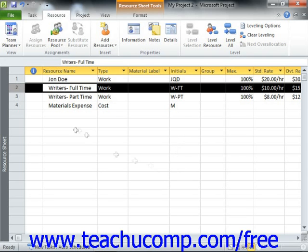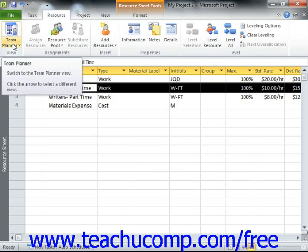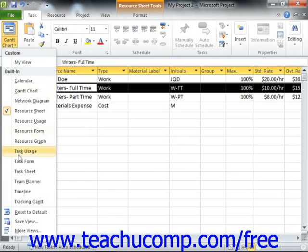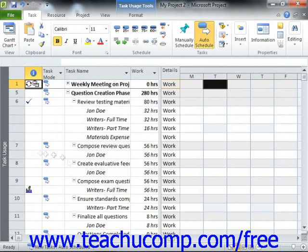In order to enter the necessary information, you will need to first switch to the Task Usage view of the project file. To do this, just click the Gantt Chart drop-down button in the View group on the Task tab in the ribbon, and then select the Task Usage command from the drop-down menu.